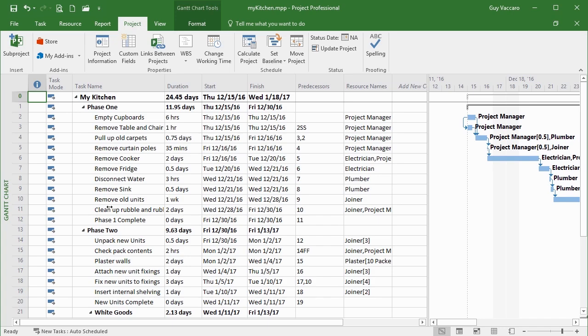Once you've moved your project start date to the correct date and all the tasks have moved henceforth, at that point, we would set what's referred to as the baseline. And what the baseline is, is a copy of each of the current task start, end date, and costs, so that we have a measurement point, so we can measure ourselves against the baseline. In order to set the baseline, we use the Project ribbon, come across to Set Baseline, and there are two options: clearing the baseline, so we can actually clear any baseline we've already put, or set the baseline.